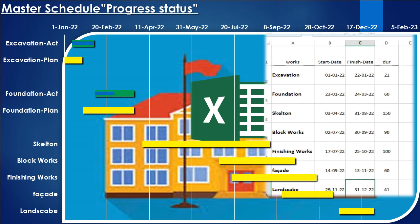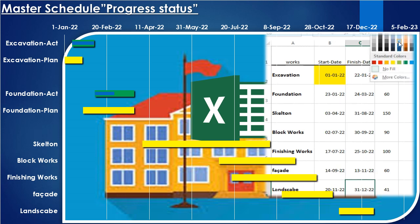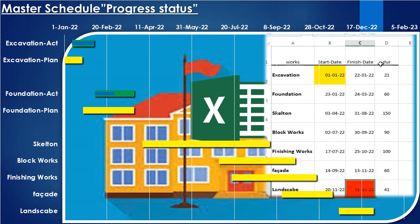Finally the site landscape works that begin after the completion of the facade work, one week, for a period of forty-one days. Hence we get the master plan to construct the building in the specified period, which is twelve months.